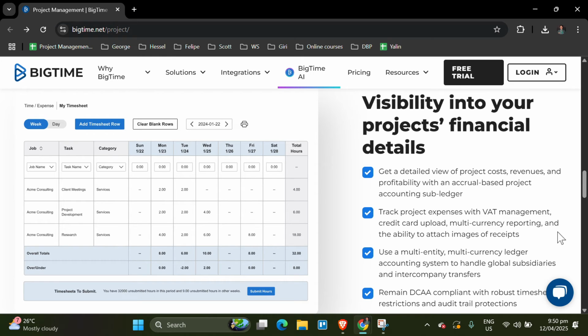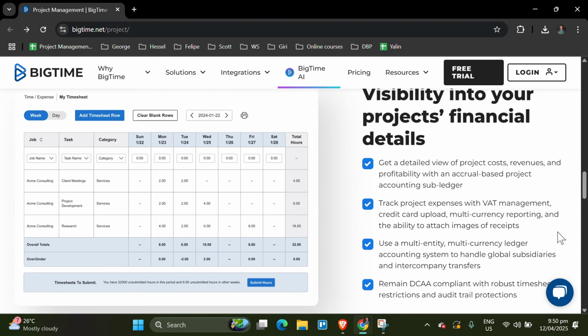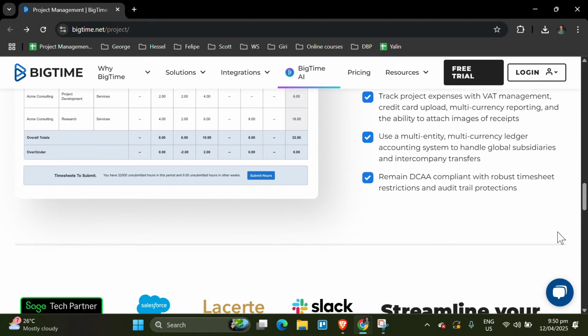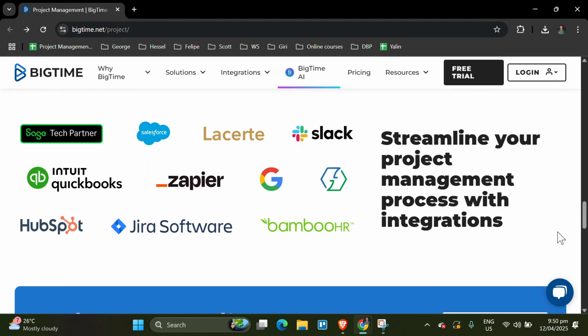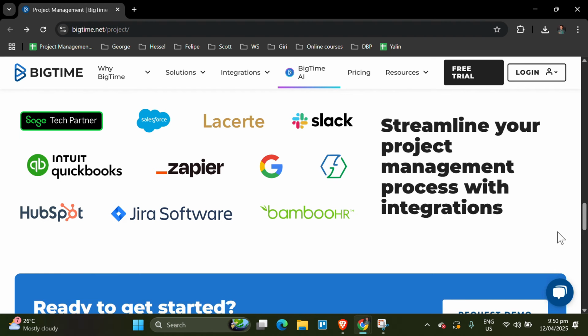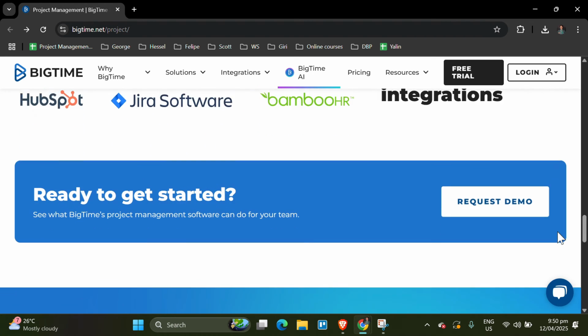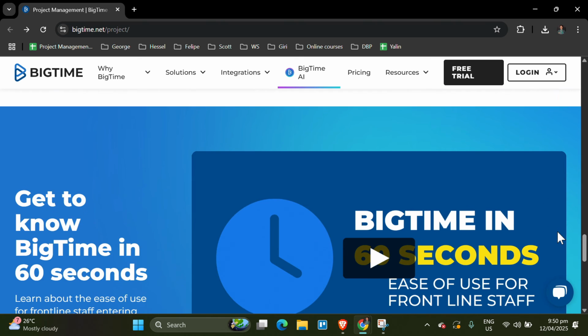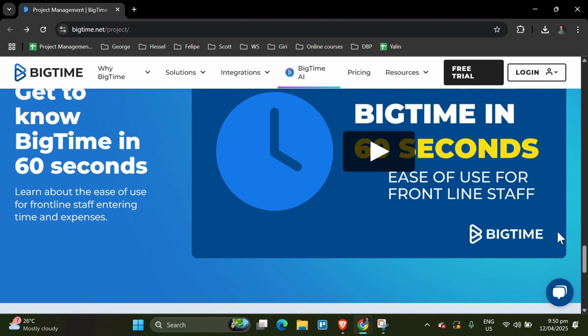Manage your team resource planning. 1. Go to the Resource Management or Staffing tab. 2. View a calendar-style layout of team availability. 3. Use drag-and-drop tools to assign tasks or shift workloads. 4. See who's overbooked, available, or on time off. 5. You can also schedule future work based on team capacity.